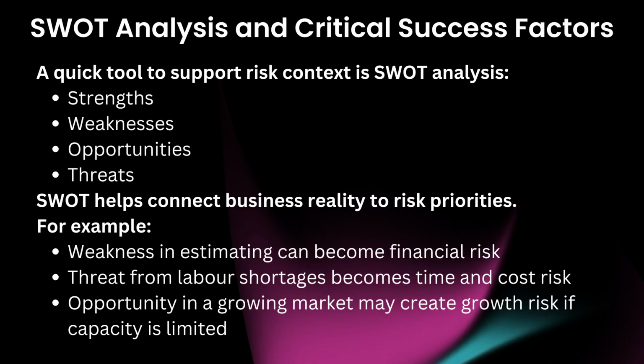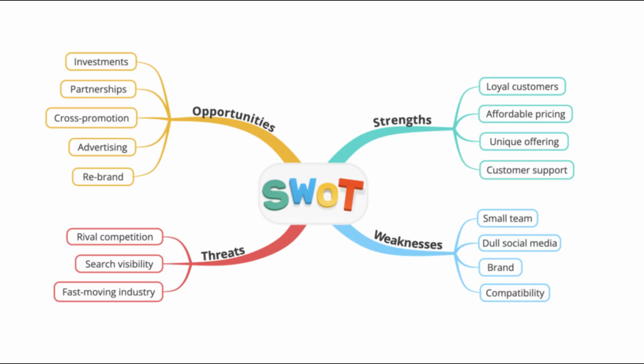SWOT analysis and critical success factors. A quick tool to support risk context is SWOT analysis. Strengths, weaknesses, opportunities, threats, SWOT, helps connect business reality to risk priorities. For example, weakness in estimating can become financial risk. Threat from labor shortages becomes time and cost risk. Opportunity in a growing market may create growth risk if capacity is limited.